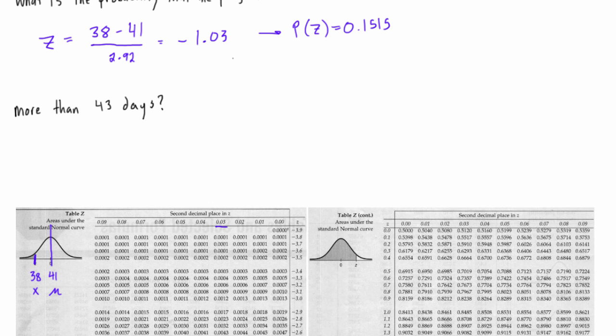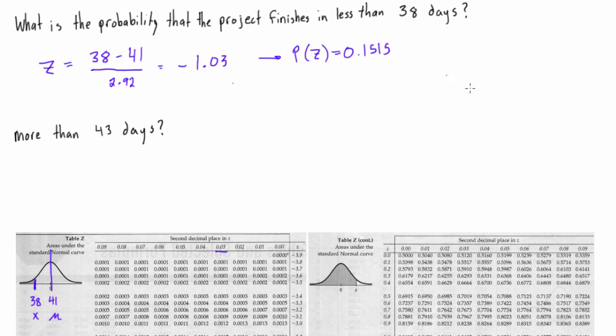So the original question was, what is the probability that the project finishes in less than 38 days? Well, that's this probability. Anything, this could be 37, 36, it just trails off, basically down to nothing. So the probability that we finish in less than 38 days, we're going to get a probability of 15.15%.